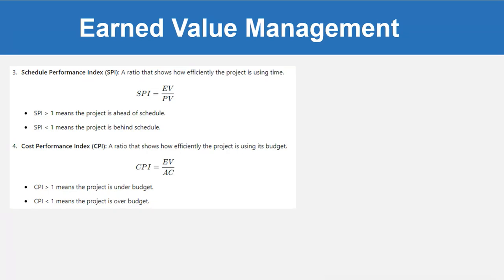Schedule Performance Index (SPI) is a ratio that shows how efficiently the project is using time. SPI = EV divided by PV. SPI greater than 1 means the project is ahead of schedule; SPI less than 1 means the project is behind schedule. Cost Performance Index (CPI) is a ratio that shows how efficiently the project is using its budget. CPI = EV divided by AC. CPI greater than 1 means the project is under budget; CPI less than 1 means the project is over budget.